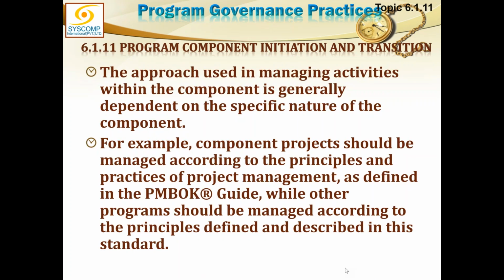The approach used in managing activities within the component is generally dependent on the specific nature of the component. Naturally, it will differ from component to component. For example, component projects should be managed according to the principles of the practices of project management. So the standard applied to the component is PMBOK. The standard applied to the program you are running and the program activities you are conducting is the program management standard. So there are two different standards.